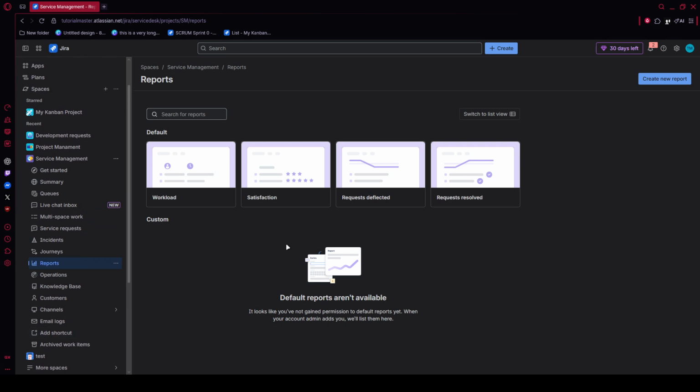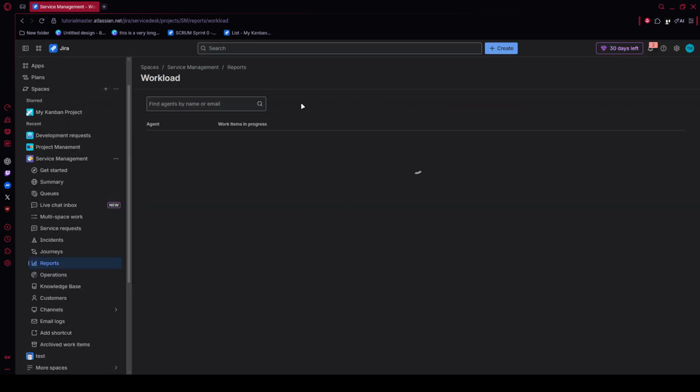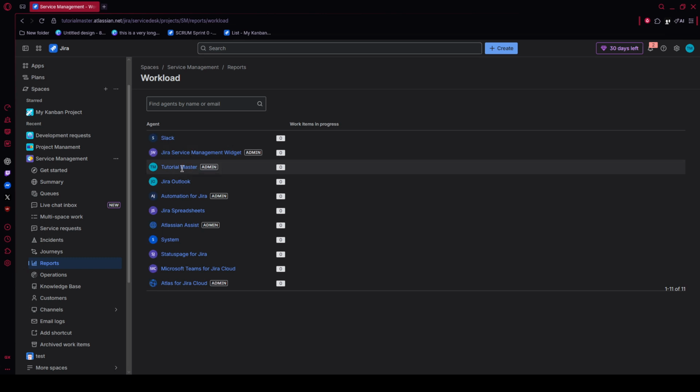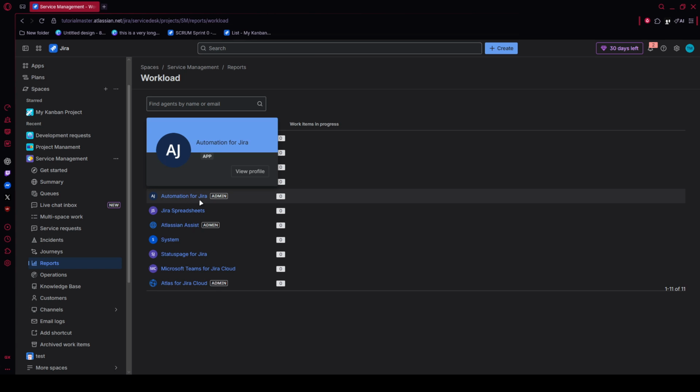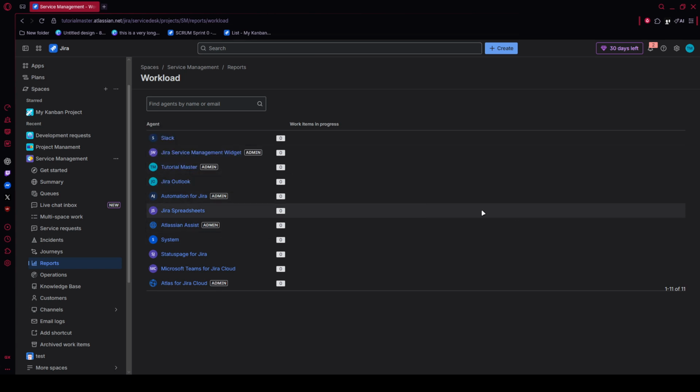Review the blue trend line to understand your average cycle time. Hover over individual dots to inspect how many days a specific issue spent in active workflow. You can also look at the shaded area to get a sense of consistency across your team's delivery pattern. By using this report correctly, you can identify delays, improve forecasting, and build a much clearer picture of engineering velocity inside Jira.